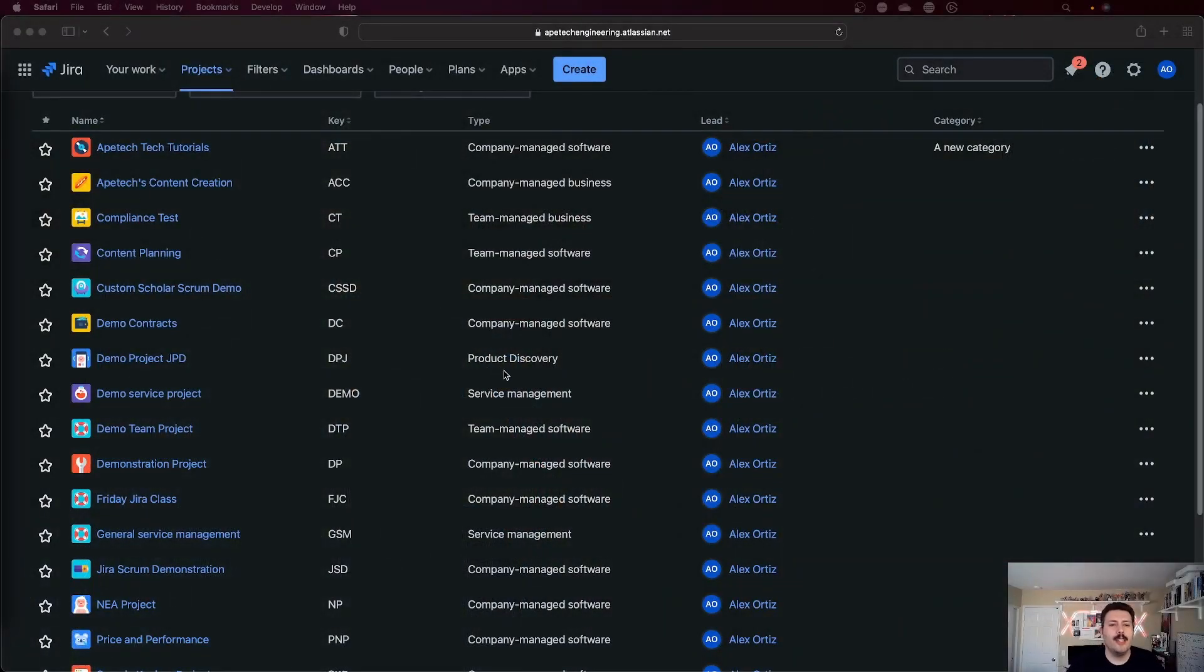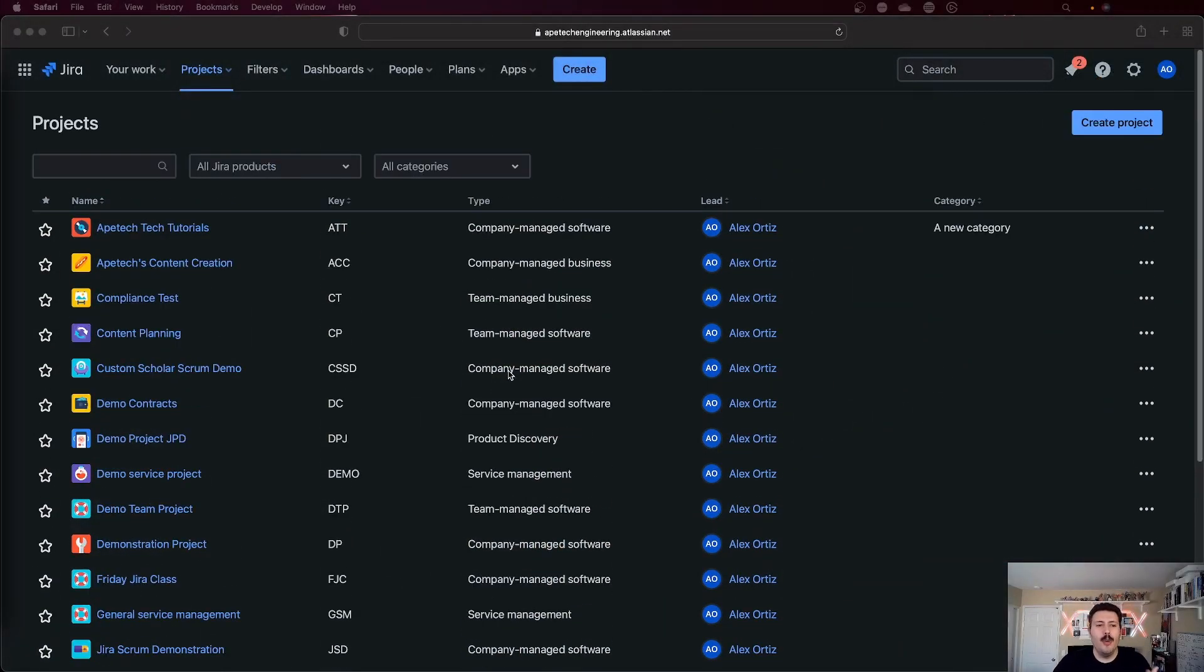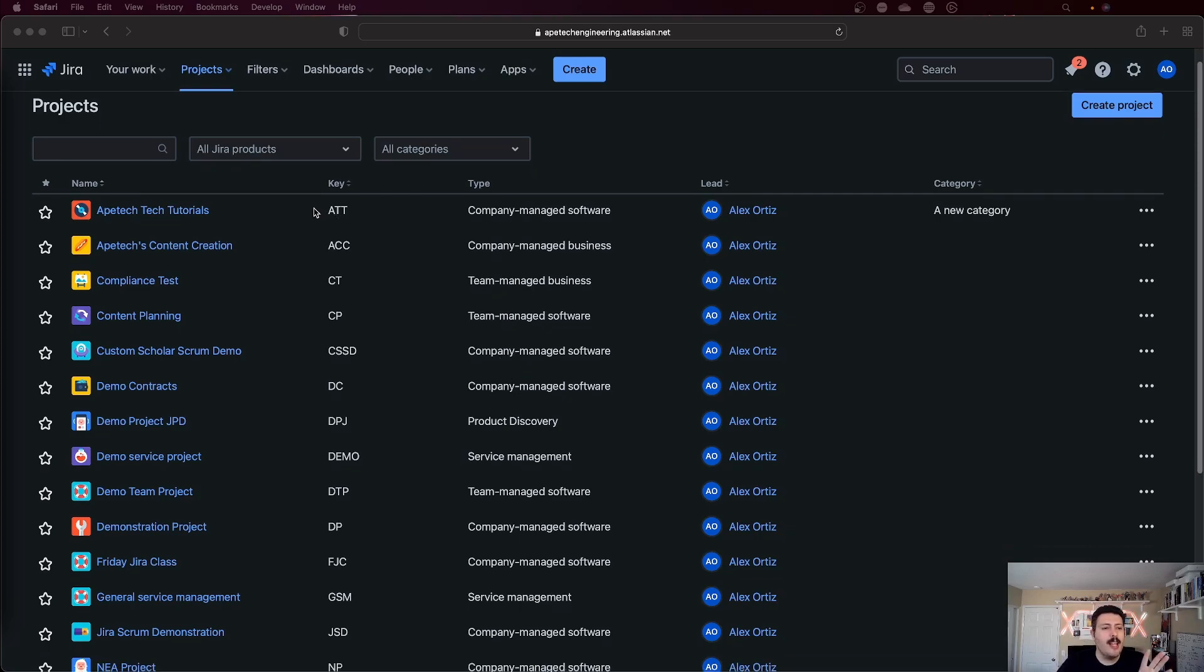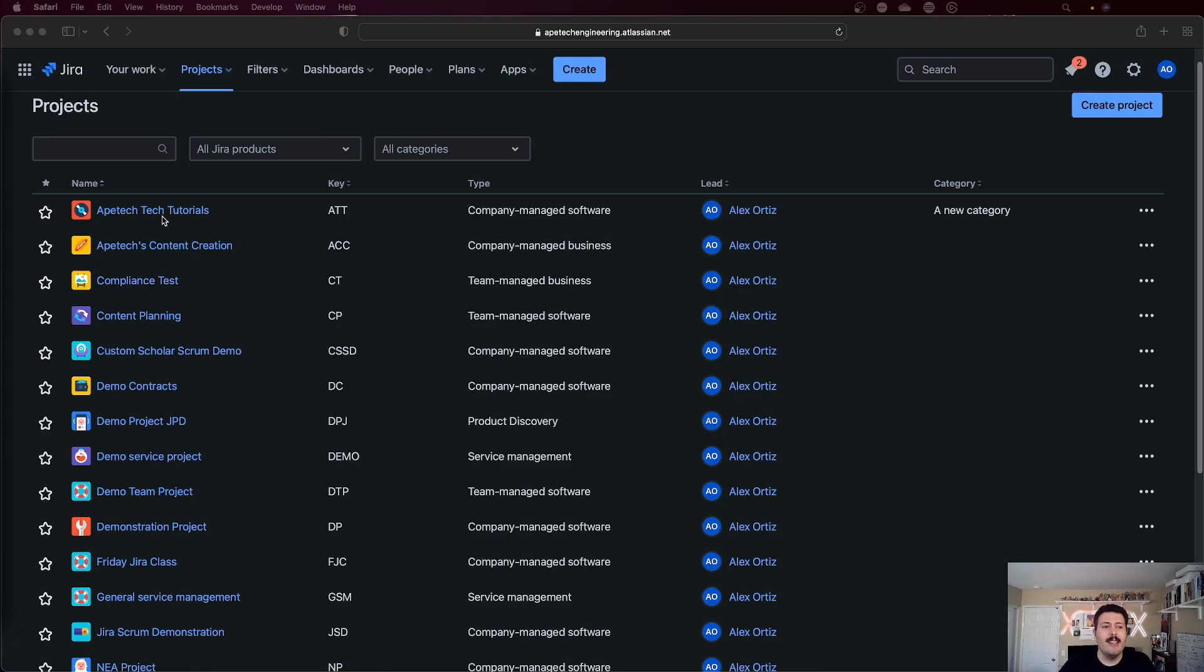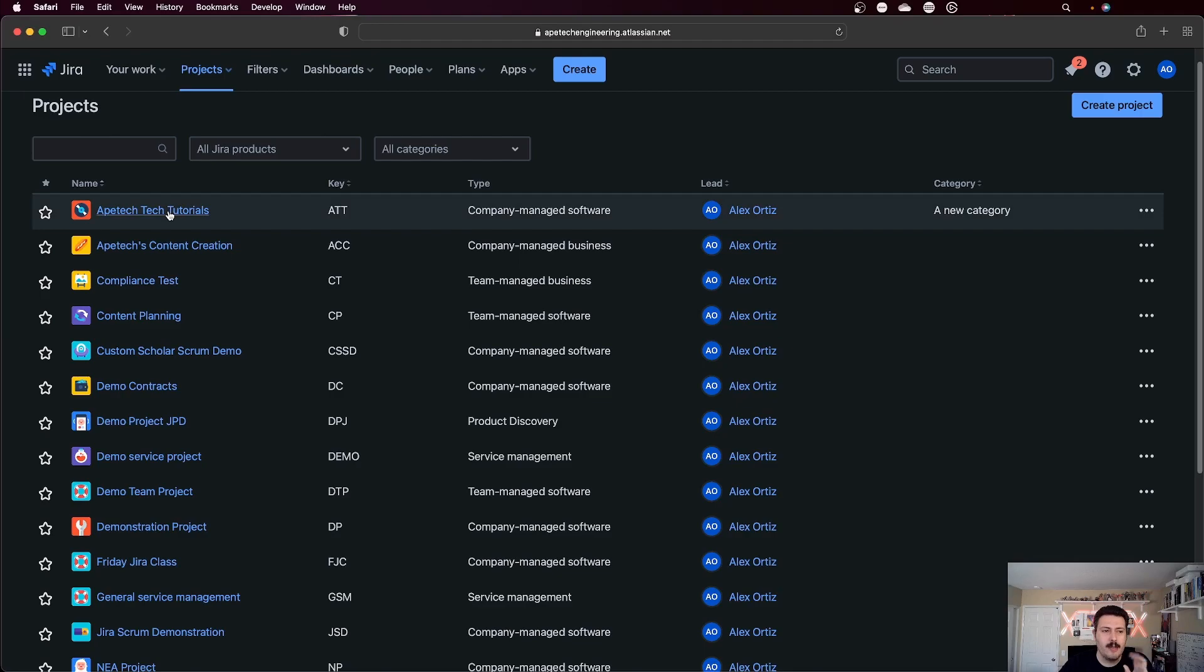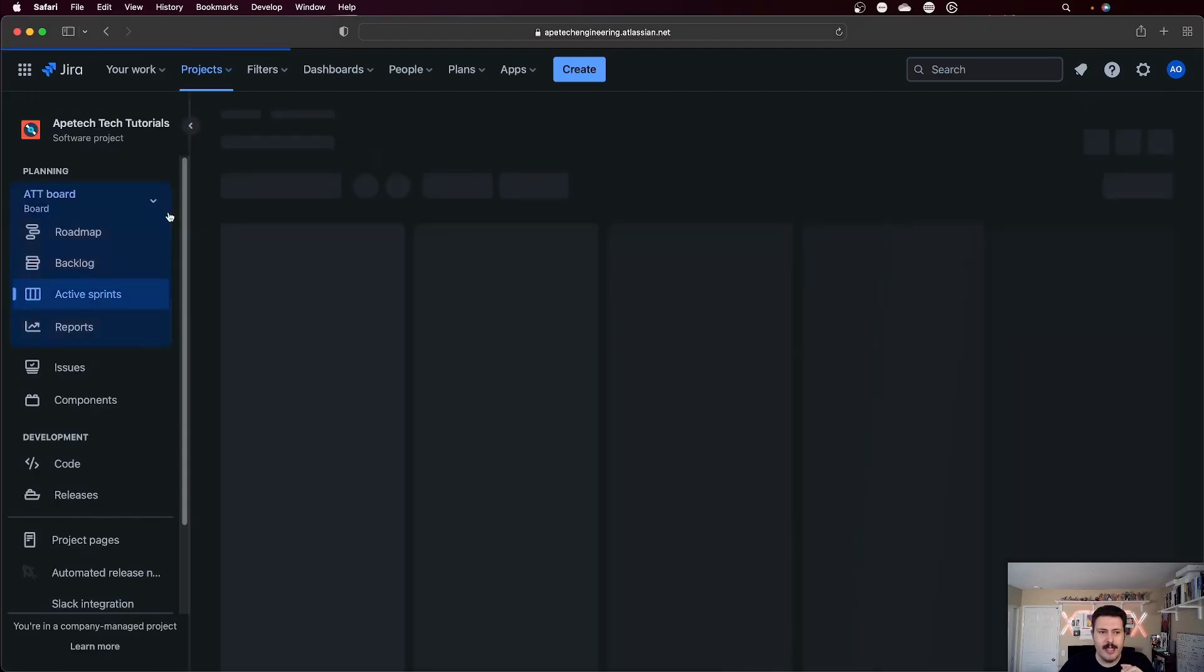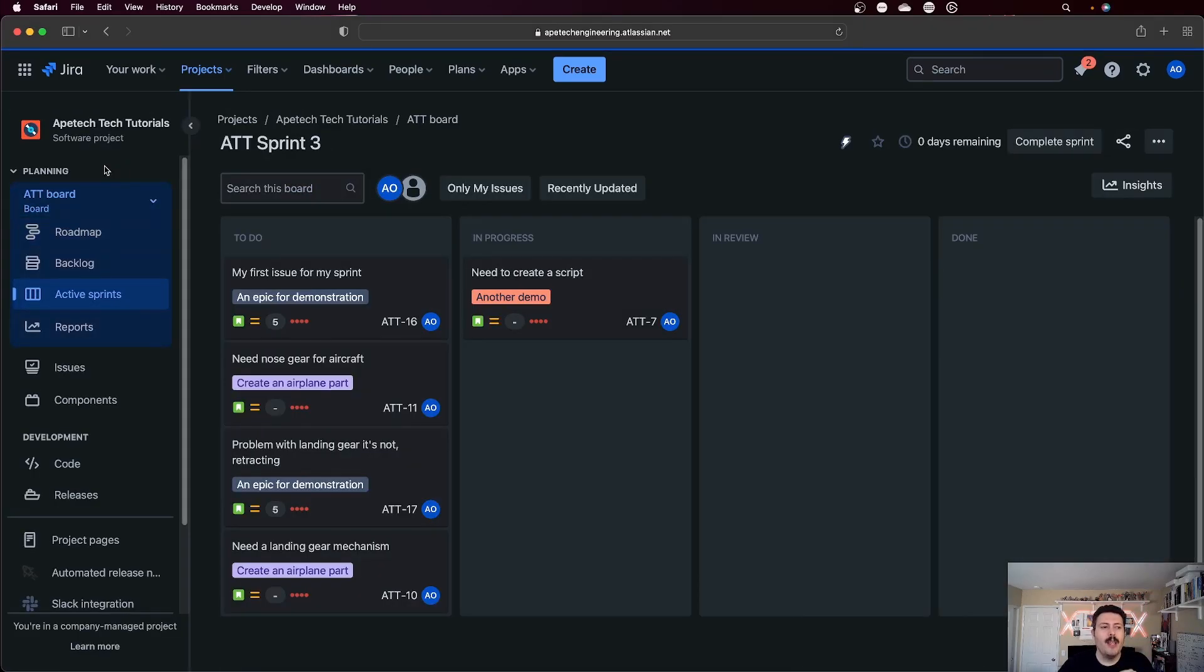All right, so going into Jira, you are probably presented or you've probably seen something like this where you just have multiple Jira projects. We're just going to pick one to illustrate what I'm trying to talk about today. When you go into a Jira project, I'm just going to click on this ATT one. You'll notice that you have a board. Usually by default, when you create a Jira project, you get one Jira project and one board, whether it's scrum or Kanban, but it's one to one.